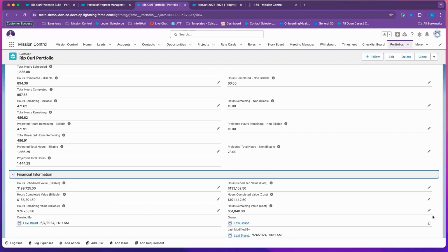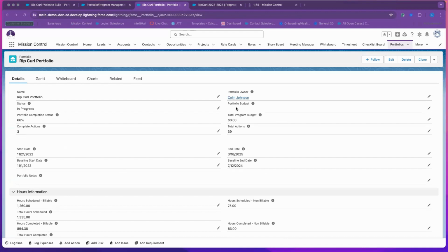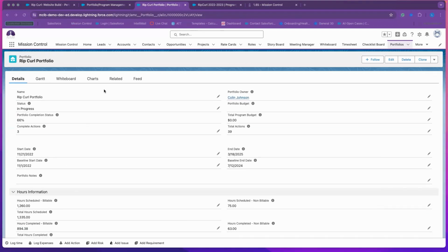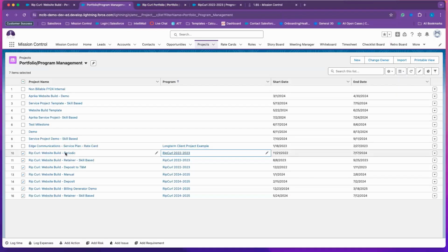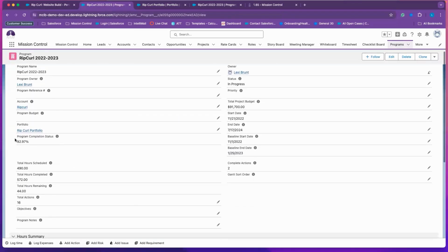Thanks for the question. So actually what happens is this information will roll up, okay? So this field is manual because the information from your project is going to roll up from your project. So it's going to basically add all of your project budget fields together, and that's going to roll up to your program. So let me go to a program really quick. So I haven't set the program budget, but the total project budget is what's going to give me that dollar amount. So that's what's going to roll up.